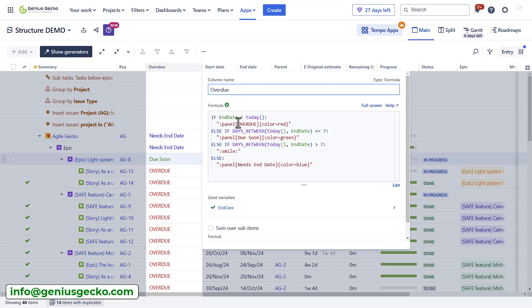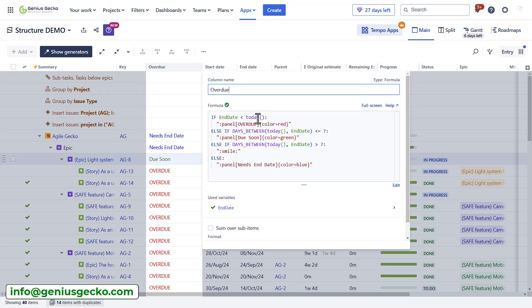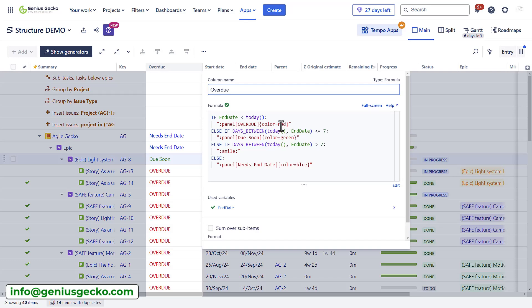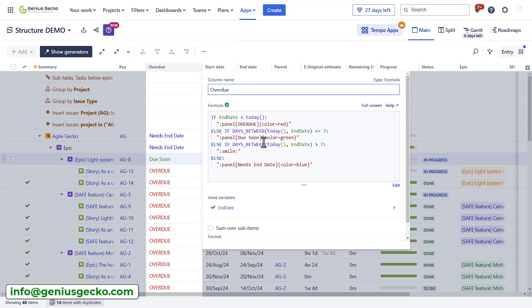What I did here, I used the end date field and compared it to the current date. Whenever the end date is earlier than today, I wanted structure to mark this field value as overdue and color coded red. When the time period between the end date and today is less than seven days, the color would be green and the notification due soon.